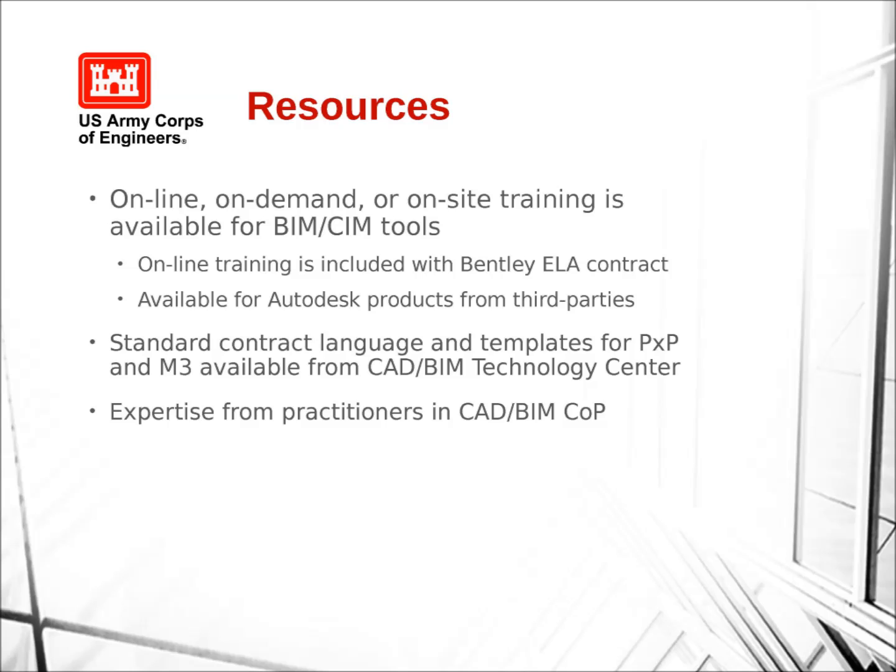And another specific thing that I wanted to mention was that when you're using a contracted resource and they have submitted their PXP on how they're going to accomplish BIM, there is a demonstration meeting that is required for them to clearly show that they have the capability and the understanding, that what they've laid out in their PXP is something that they can actually accomplish.